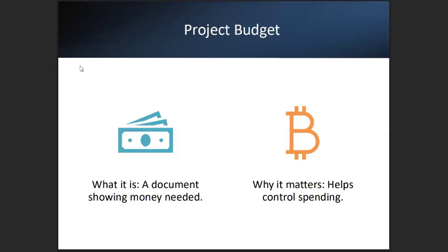Now we have the project budget. Project budget is another planning tool, because this enables you to plan towards the budgetary allocation of this project. So within the budget, you identify what needs to be done, who needs to be paid, and how much they need to be paid. Of course, all those must have been in line with the negotiations, for instance salary negotiations, contract negotiations for human resource, the price tags for technical resources and technical infrastructure. You already know all those price tags. So all you need to do is come to the budget document, put those into perspective, and have them documented.